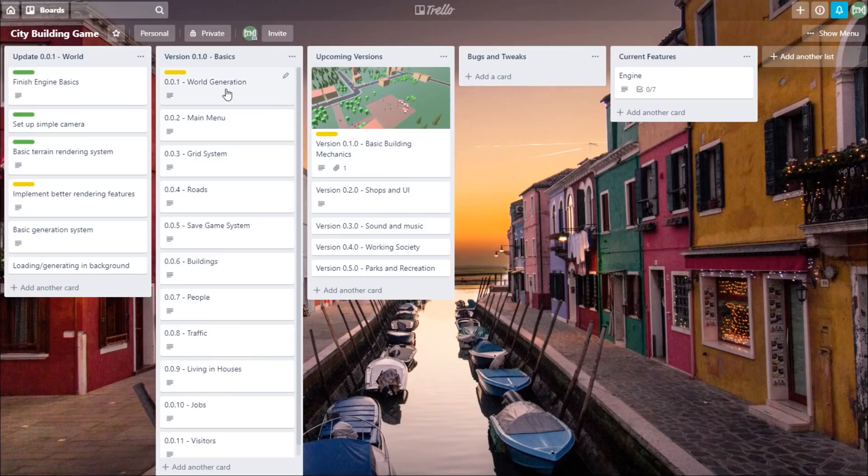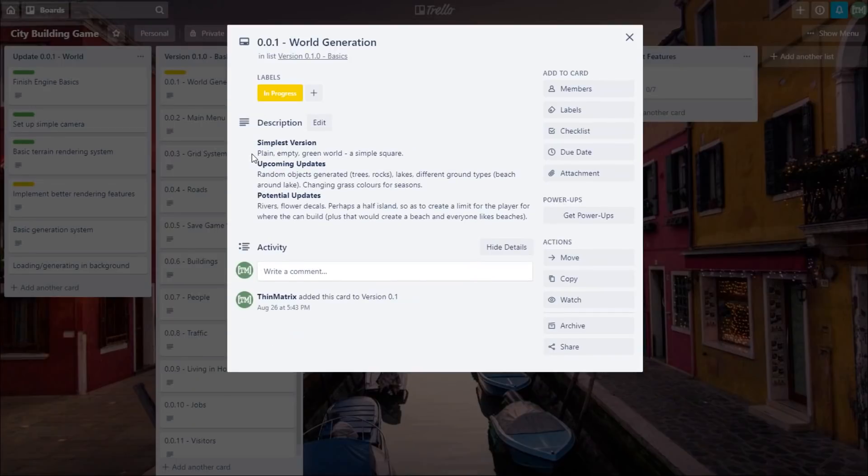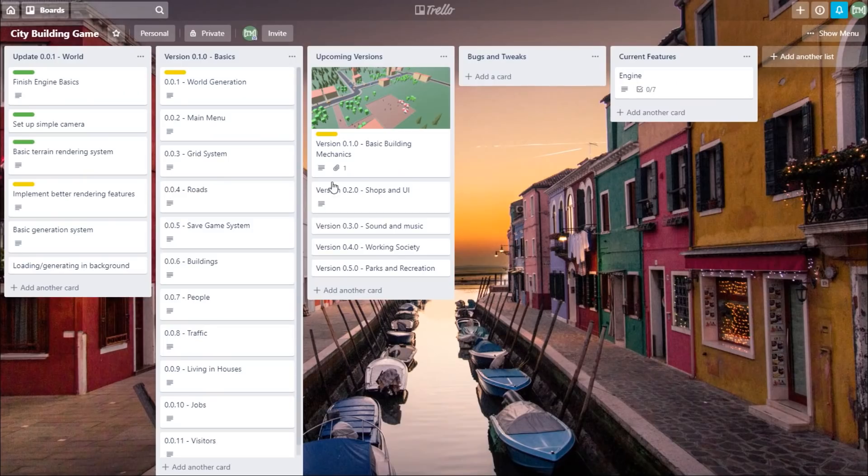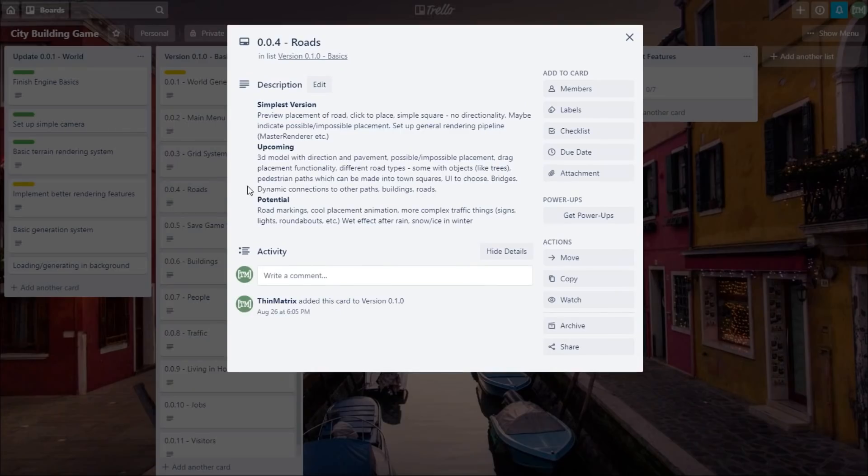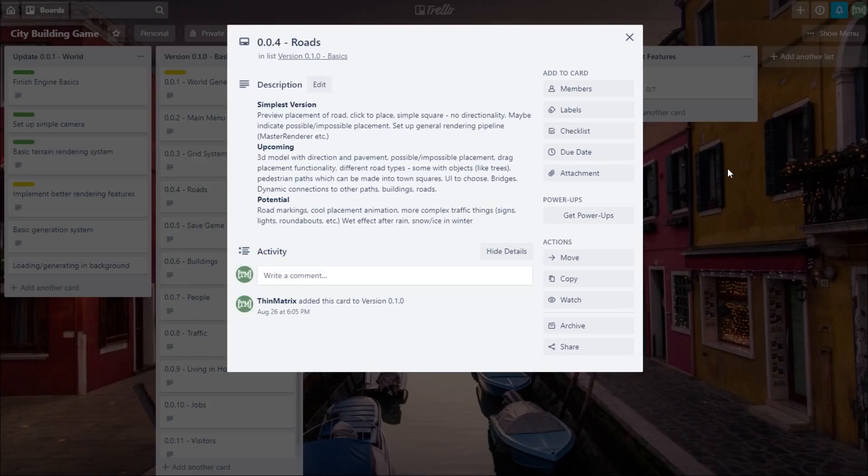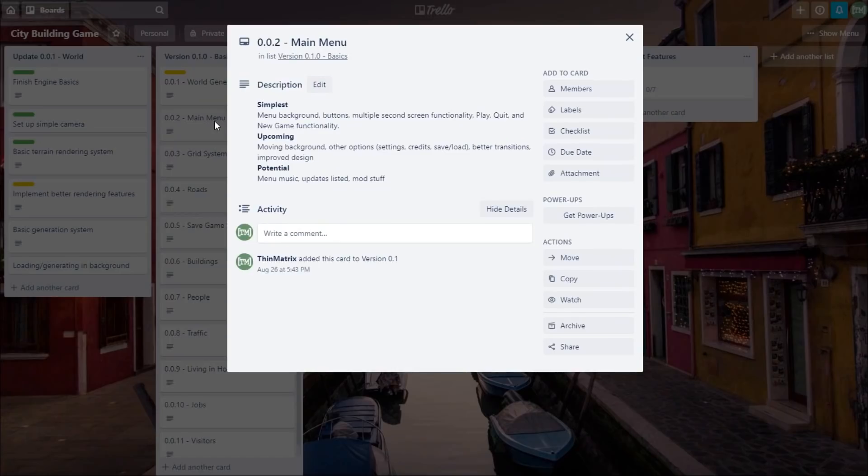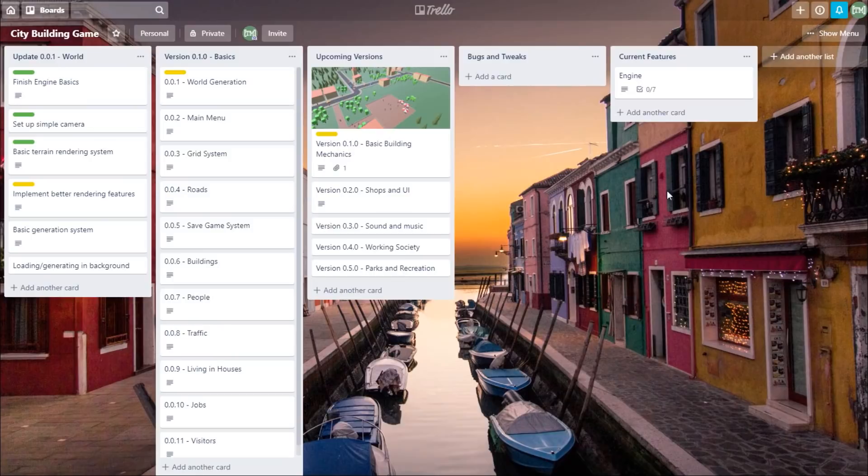And then for each feature I've written down the simplest possible version of that feature, and that's what I'm going to be implementing first. You can also see that I've written down all the things that I've got planned for each feature in the future, in future iterations. And I've done this so that I keep that in mind while I'm implementing the simple version, because I want to make sure that when I implement this really simple version of the feature that I do it in a way that's scalable, that's future-proof, in a way that can be easily built upon in the future, and not just something that's going to be redone at some point, because that would just be a waste of time.